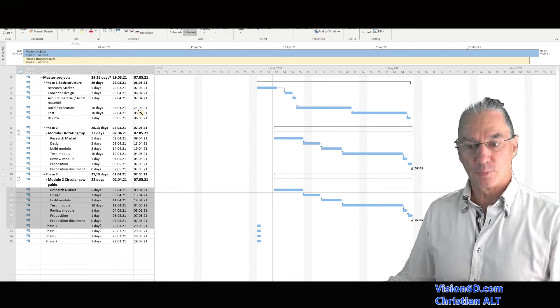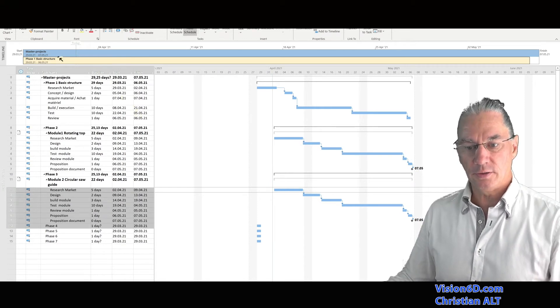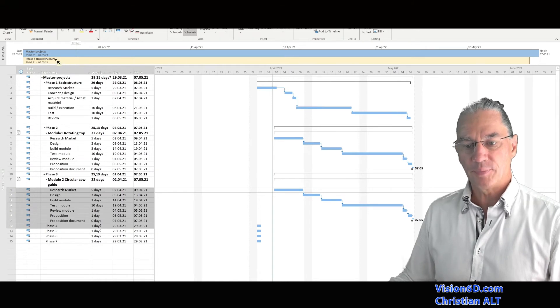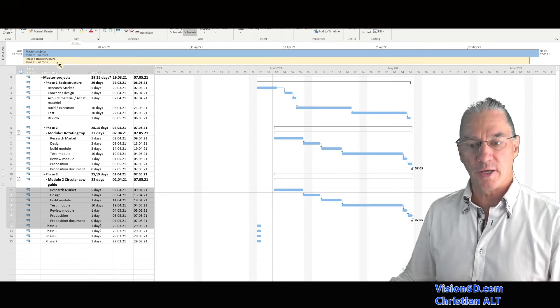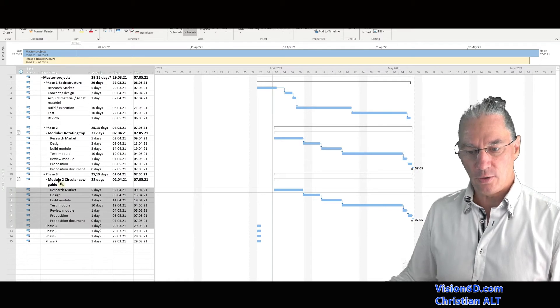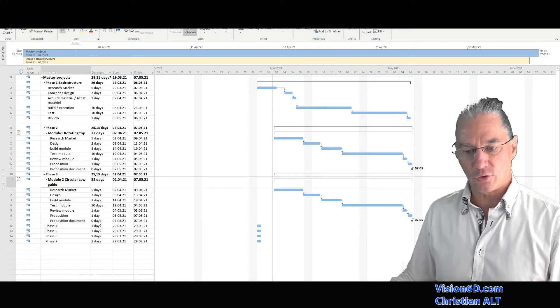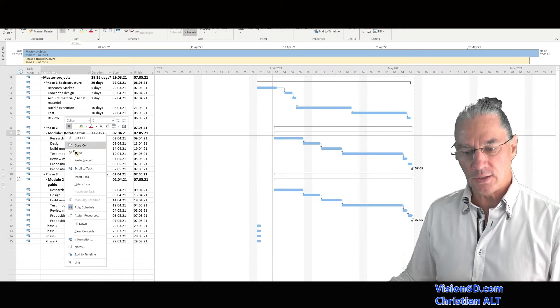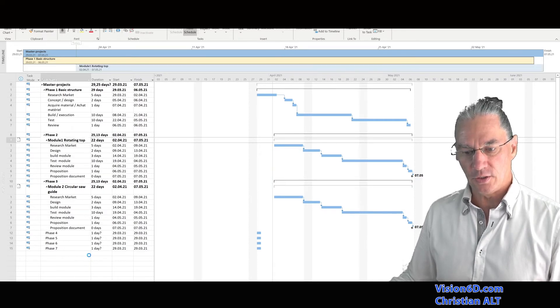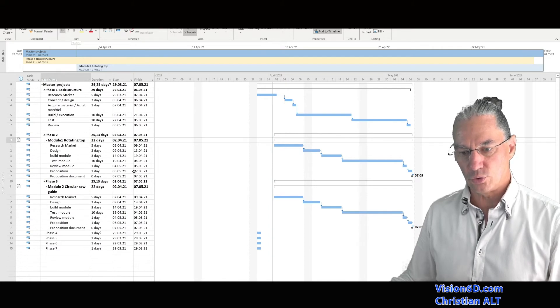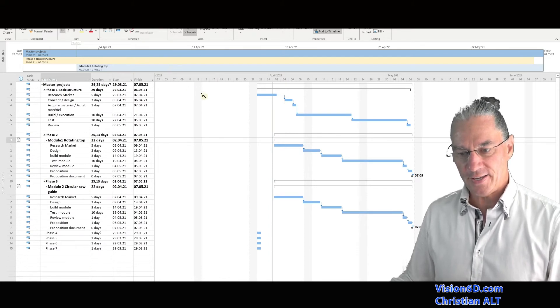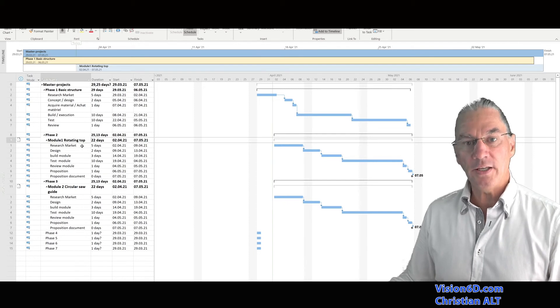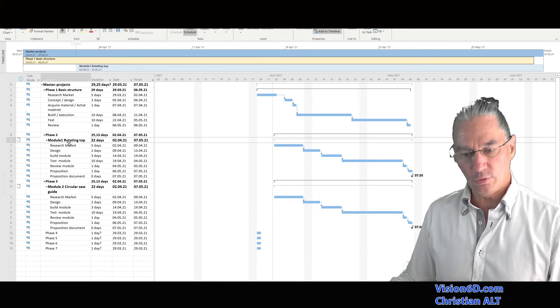In the master project here in the timeline, you see that we have the master project and we have the first phase, which is the basic structure. Now, I want to add, for example, the first module here also to see it on the timeline. So I go here, I do add to the timeline and I have it. So now I'm going into that module.